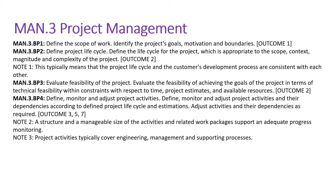BP2 talks about the project life cycle. Your project life cycle may be waterfall model, V model, or agile. You need to define in what way you're going to execute your project going forward - define the life cycle appropriate to the scope, context, magnitude, and complexity of the project. If you know the scope of the project completely, you can follow the traditional waterfall model or the V model. But if you're quite ambiguous about the work scope and don't know what work will come in the next cycle, then you have to follow agile - it would be more feasible.